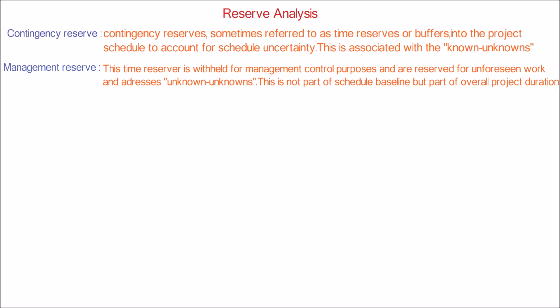Here we are using bottom-up estimating. Let's say we have estimated the duration of three activities as 10, 20, and 25, and they belong to a single work package.